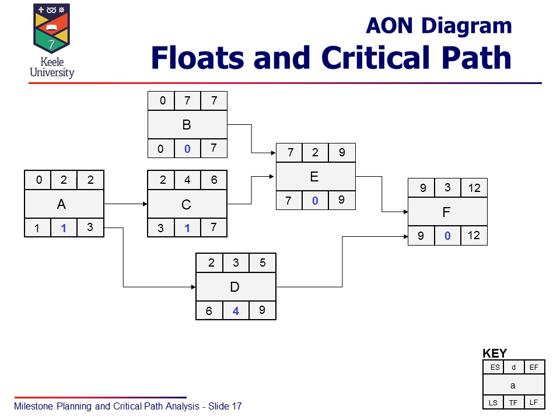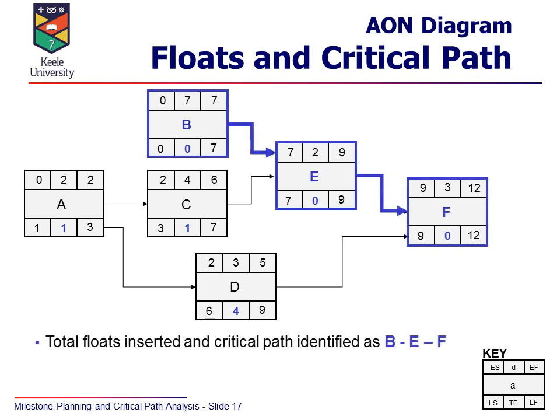So if you fill in the other figures in there, we start to see emerge from there that the critical path is activities B, E, F. That's the one where we have to really ensure that activities start and finish on time, because otherwise the project as a whole gets behind time. Whereas the other activities, there is a degree of slack. We can delay activity A by a day without putting the project back as a whole. We can delay activity C by a day. Or activity D, we can delay up to 4 days.